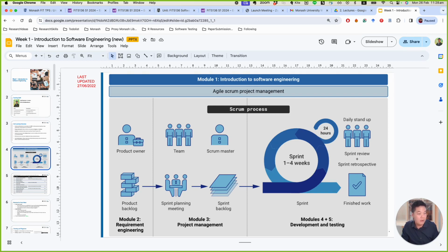That means it really depends on the client whether they want the project to overrun or not. So we leave that constraint to the client rather than taking it ourselves. You know what I mean? Most companies use this model as well, based on man hours rather than a fixed price contract.